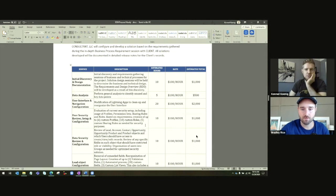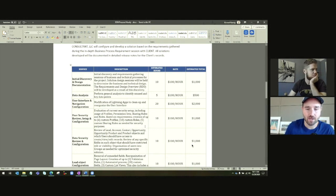Yeah, I mean, do you normally charge different rates? No, different? I just wanted to make sure that it's as simple as hours times dollars equals total. Doesn't matter. So if I say, man, 20 hours sounds like a lot, let me chop that and add another 5 to data analysis, it's all the same. Like everything's always the same. Okay. Yes. Yeah, it is. Yep. That makes it clean.